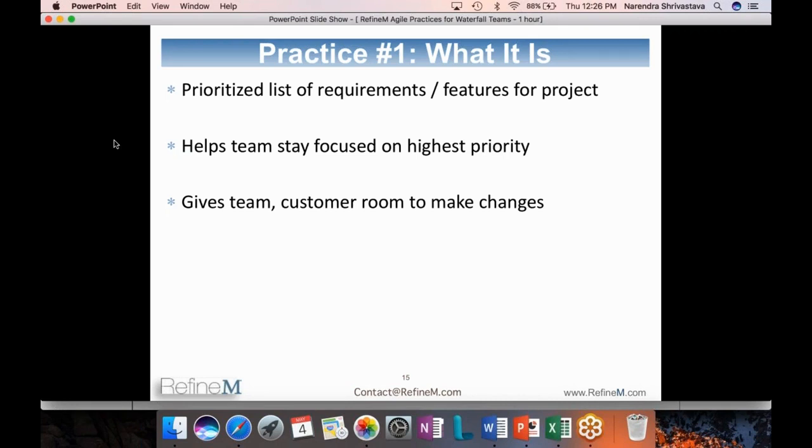And in case there is an issue of budget or scope, or somebody is asking how do you handle scope creep. So basically, in agile projects, scope is something which is flexible. Your time and cost are fixed, but scope is flexible. So within that time and cost, you deliver the most items from the top of the backlog, and the remaining items that are not delivered are at the bottom of the backlog, and they are not so valuable.